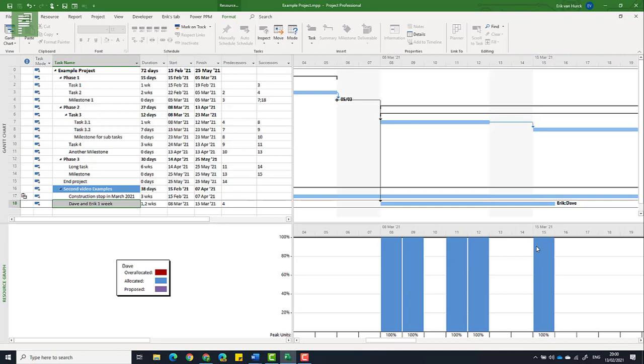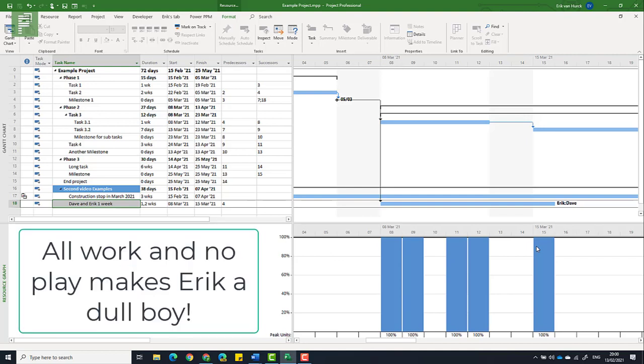Now, as a default, Project only schedules tasks on work days. That means that a task of a week is actually just 5 work days. And as a default, each day contains 8 hours of work. That means that working from Monday till Friday, people work for 40 hours in total. And here's the catch. That will be done all year round if you do not specify differently, if you do not give it an actual calendar.